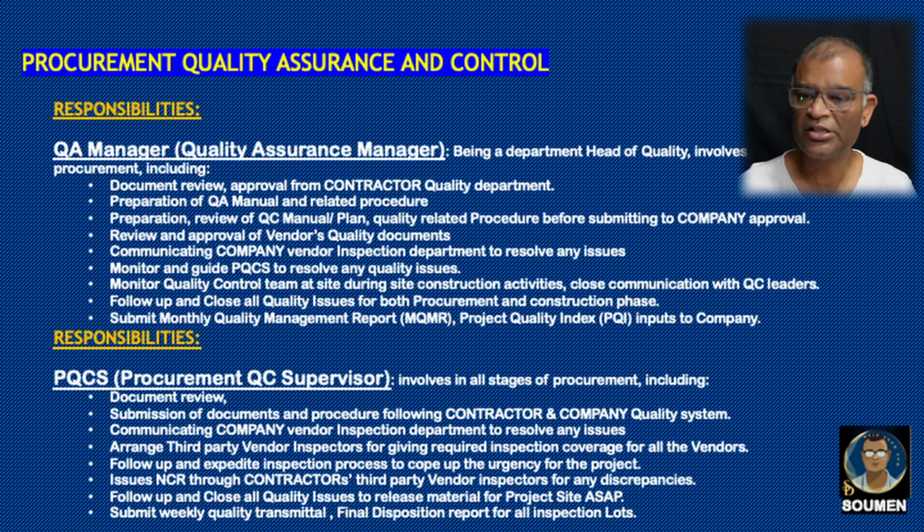Actually, the QC manager is supposed to report to the QA manager for any site quality issues. Follow up and close quality issues for both procurement and construction phase. Submit monthly quality management report and project quality index related inputs to the company. So QA manager has a very important role in project quality.